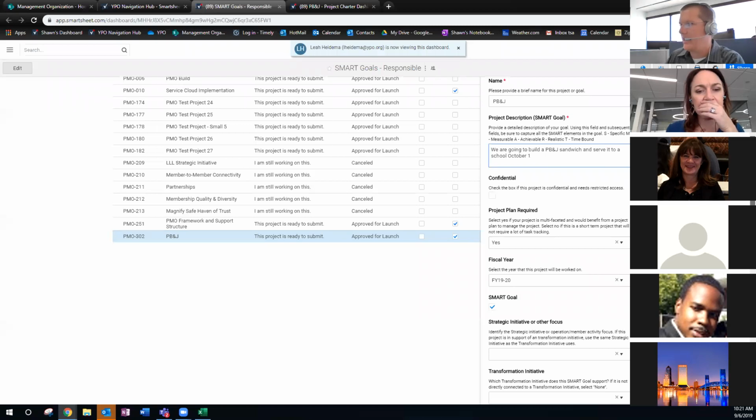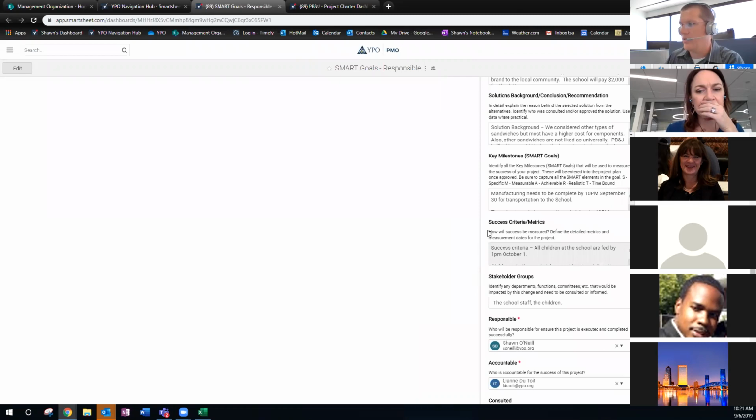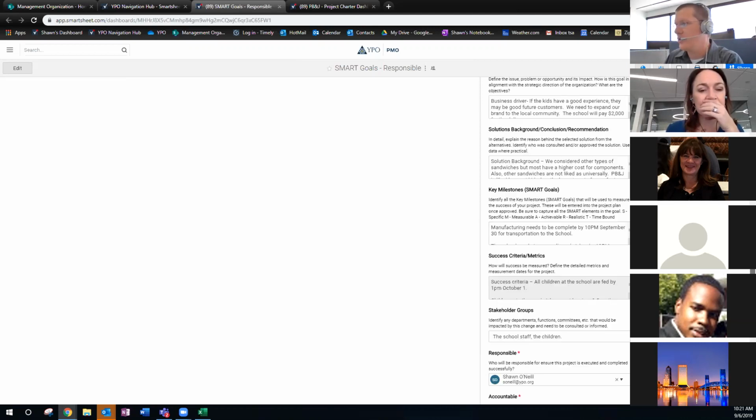What you cannot edit, and you may need approval for, are the success criteria, because what management doesn't want is people coming in June 30th next year and changing their success criteria to make it successful, which is different than what was approved on the charter. So, but for the most of this stuff, you can update it.